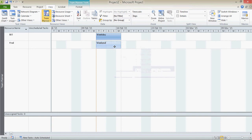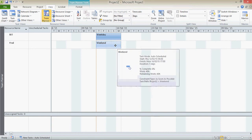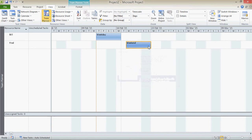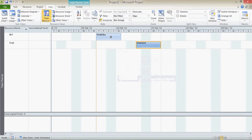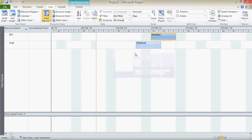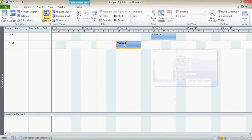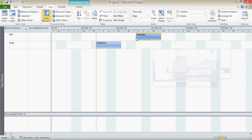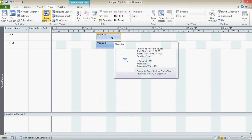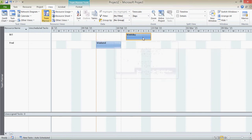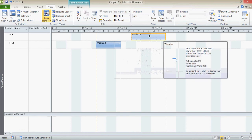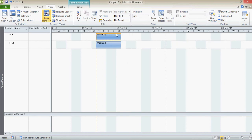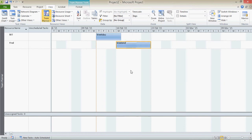Now if I actually move these tasks somewhere else, you'll notice that what it's actually done is it's taken out where it was non-working times. So that's how it's actually done it. So it's fitted them in by removing the fact that there were non-working times there. If I were to drag it over a non-working time period, again it will extend out to fit the available working time.